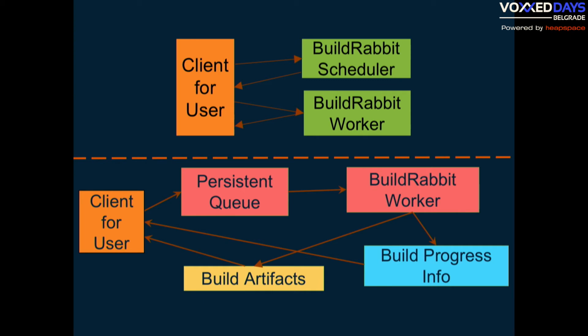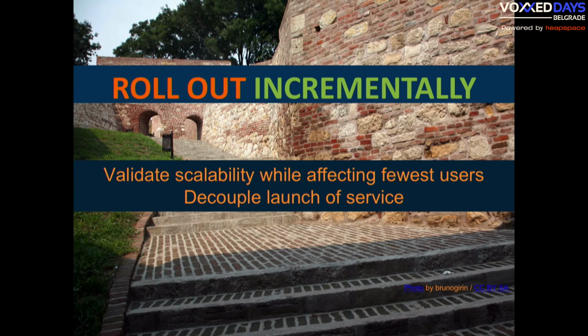The other advantage here is every single one of these components hit some sort of roadblocks during this migration. And so by not having the whole migration depend on all of the components being ready at once, it allowed us to make forward progress and start improving our system and rolling out the improved system to our users as soon as possible without having to wait on all the components being ready. And that also required additional understanding of the intermediate states, what it means for one of those new components being up and both of them being up and then all of them being up.